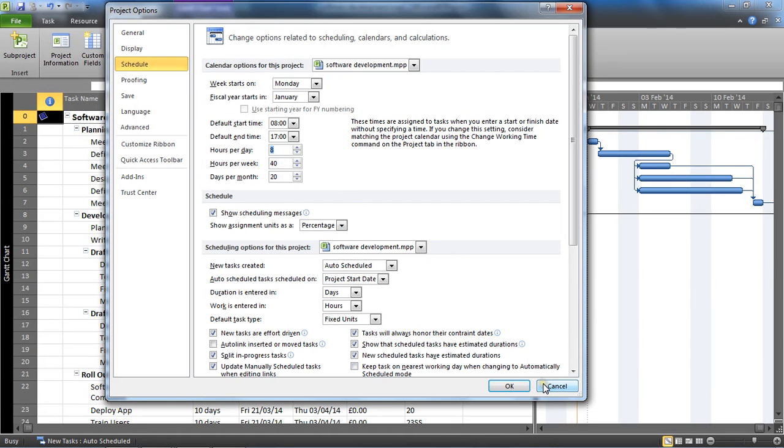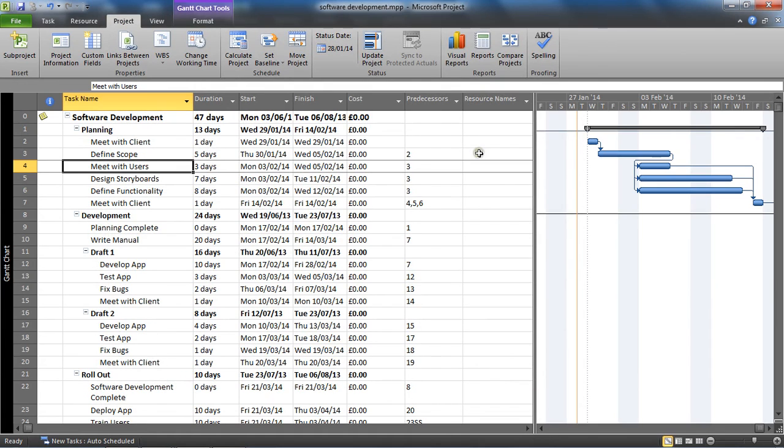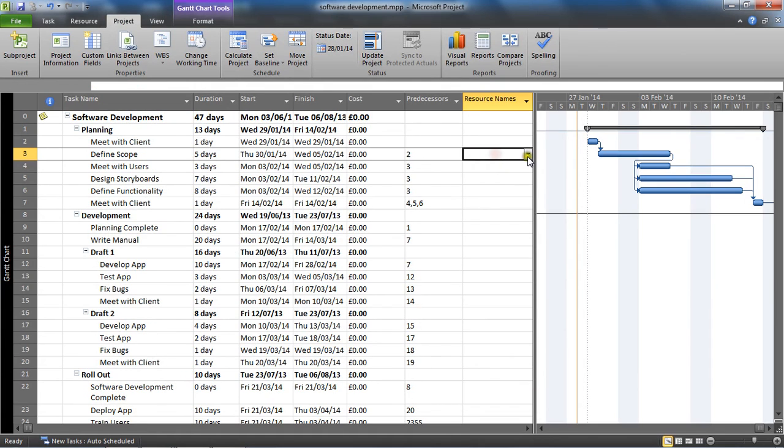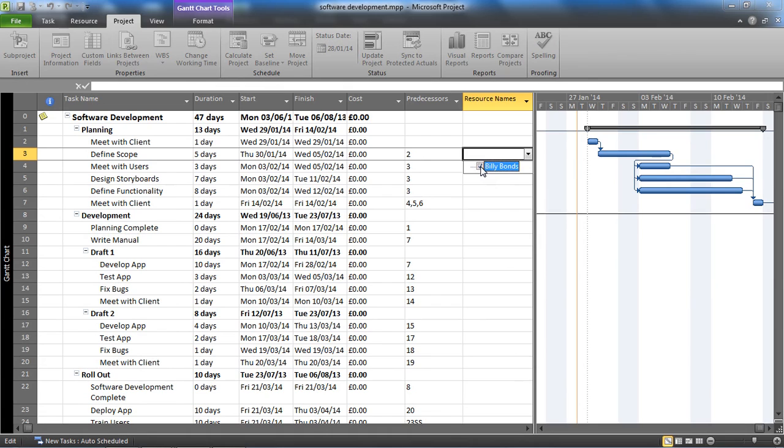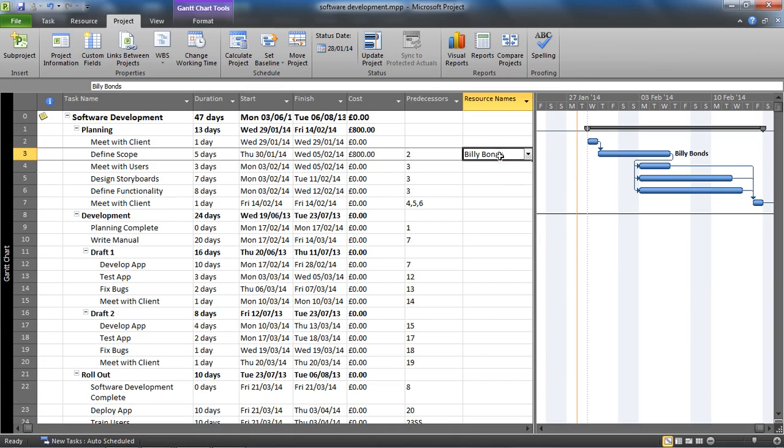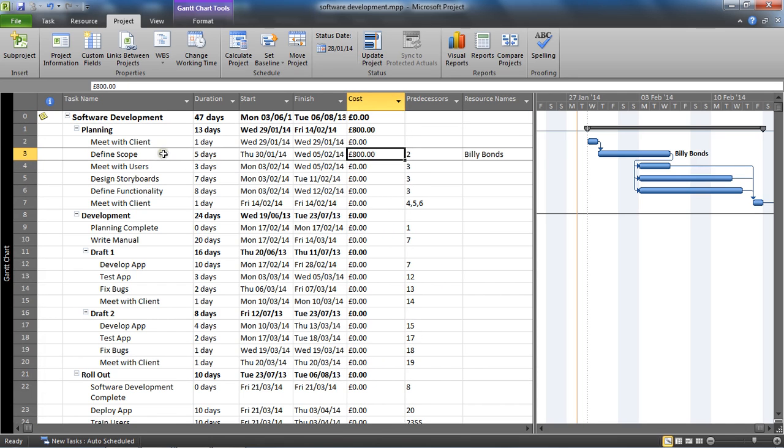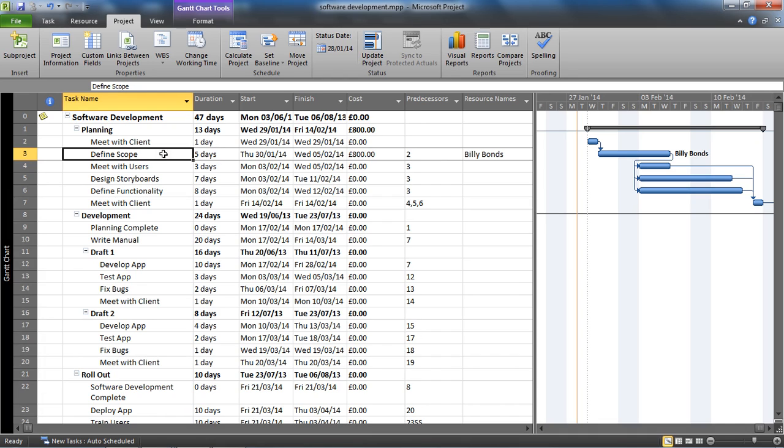I'm now going to assign Billy to that task. Billy gets assigned to Define Scope, this five day task, which means Billy is doing eight hours a day on that task. I've also inserted this cost column so we can see some cost information as we go. 800 pounds is assigned because Billy does 20 pounds an hour standard rate, an 8 hour day making 160 pounds a day, times by five.